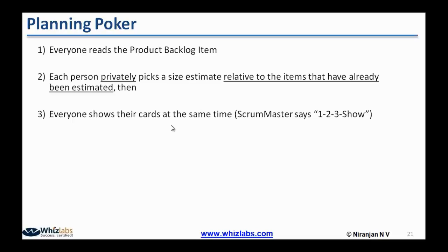What the Scrum Master will do is, we have to agree on one particular number. Now these 4 numbers are quite different. Maybe 8 and 11, the second and third number, are not too different, but the first team member has estimated 3 story points, and the fourth team member has estimated 40 story points. There is a lot of variance between these 2 numbers.